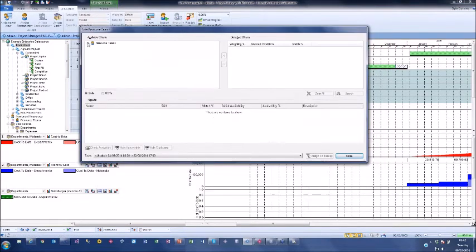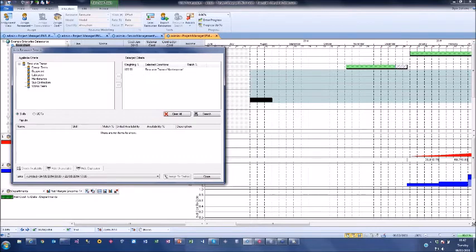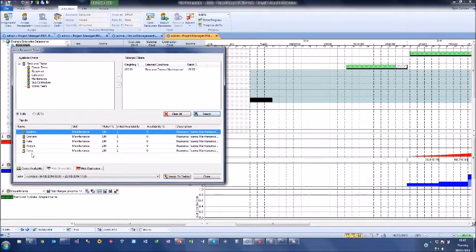It's based on a number of criteria. So in here I can have my teams, but I could have further criteria assigned to them. And I can say I need a maintenance person to work this task, and if I reduce this down, I'm looking for someone to work that particular task. I know I want this type of person. Click on search. It will find all the relevant people that match my criteria. If they were multi-skilled, I might choose multiple ones, and it would show my match to that.